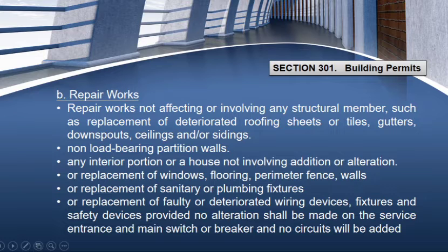Another, replacement or repair works of windows, flooring, perimeter fence, and walls. Repair works or replacement of sanitary or plumbing fixtures. Lastly, repair works or replacement of faulty or deteriorated wiring devices, fixtures, and safety devices, provided no alteration shall be made on the service entrance and main switch or breaker, and no circuits will be added.